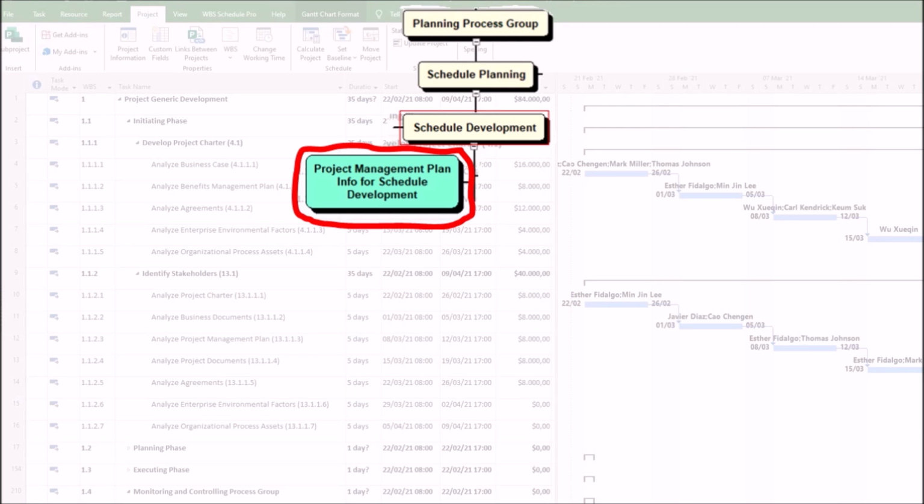A poor project management plan analysis can lead to a fragile, unreliable schedule, increasing the likelihood of project failure. It can lead to real-world consequences, such as, first, project delays from overlooked dependencies or resource shortages. Second, budget overruns, due to unrealistic timelines requiring crash efforts. Third, stakeholder dissatisfaction from unmet expectations or poor communication. Fourth, project failure, if the schedule is fundamentally unworkable.